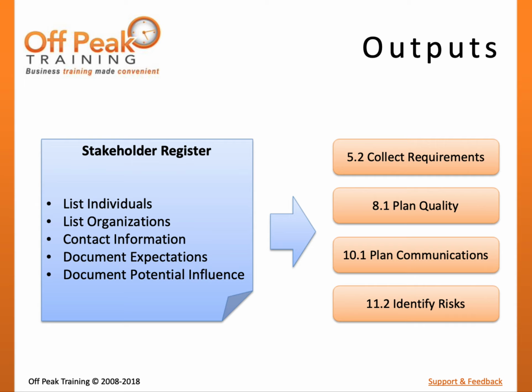Because stakeholders must have an active role in determining the product and quality requirements, this project document may be used as an input to collect requirements and the plan quality process. The stakeholder register will also be an input to the plan communications and identify risks process to help ensure they are being informed throughout the project lifecycle and that their risk tolerances are being considered.